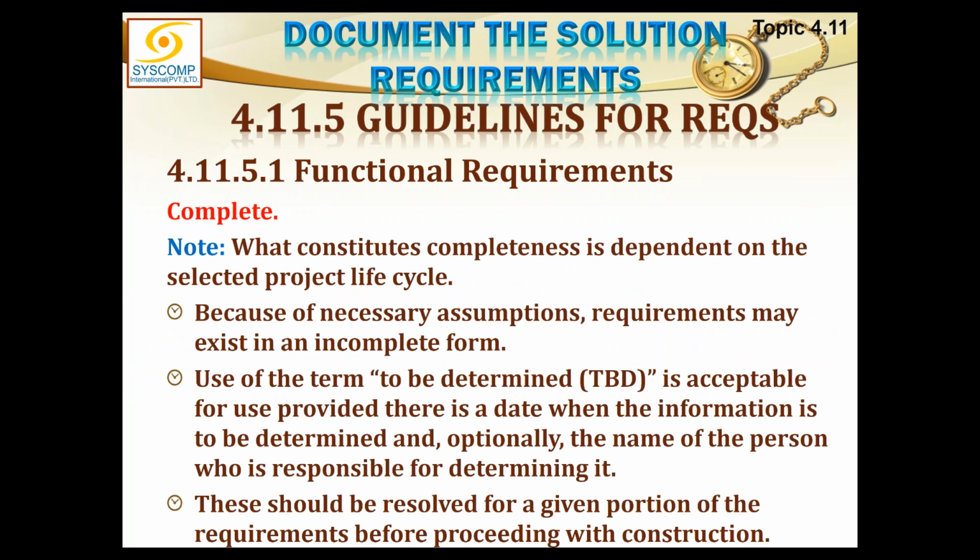What constitutes completeness is dependent on the selected project lifecycle. Because of the necessary assumptions, requirements may exist in an incomplete form. The term to be determined, TBD, is acceptable for use provided there is a date when the information is to be determined and optionally the name of the person who is responsible for determining it. So assign this responsibility to someone to fill in the gaps. These should be resolved for a given portion of the requirements before proceeding with construction.